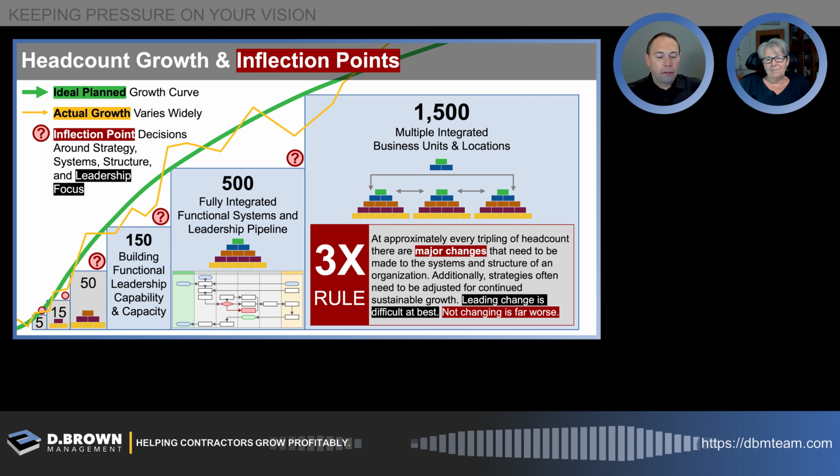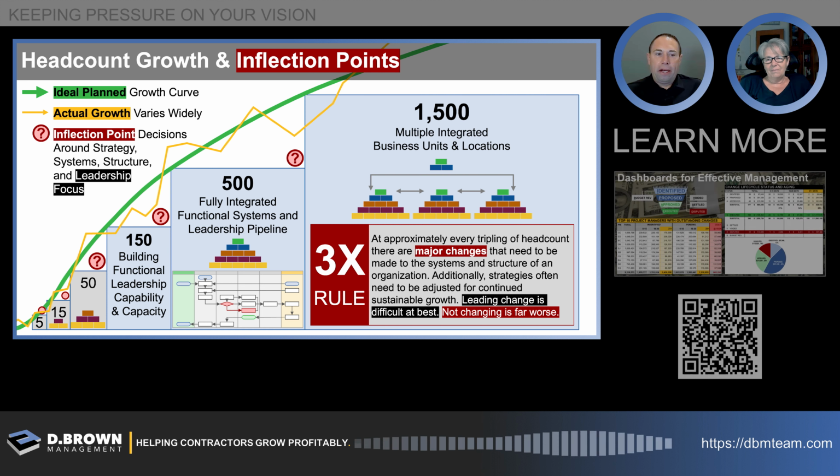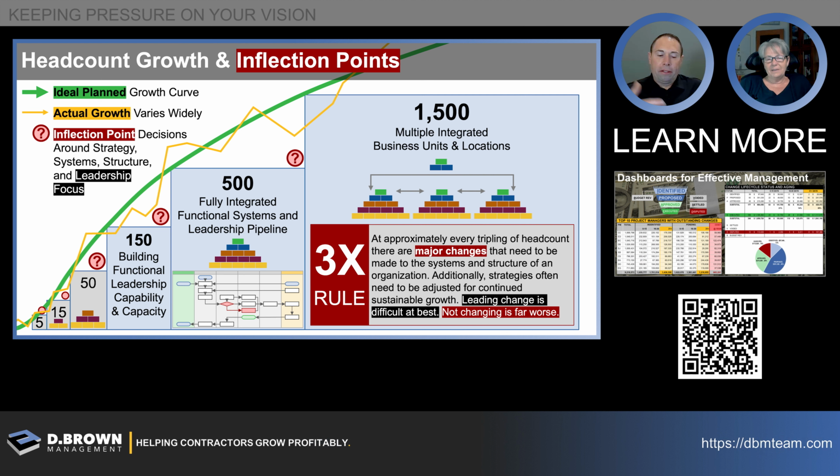And so that made me recognize I needed a different system. I needed some different summary level information. I needed a different person to go check, because a lot of times what you end up doing is bypassing the control. Instead of spending 30 minutes really studying the change order log for a project manager and asking them good questions, you just glance at it like, looks okay, which is not really quality control or quality assurance. And so now you're bypassing that control.